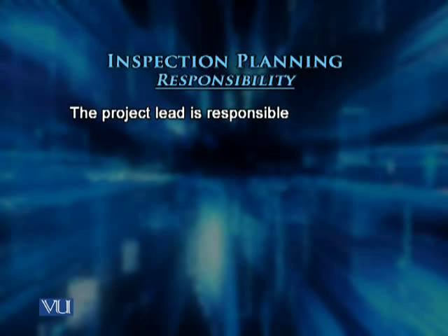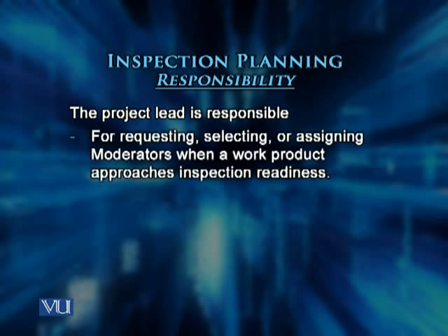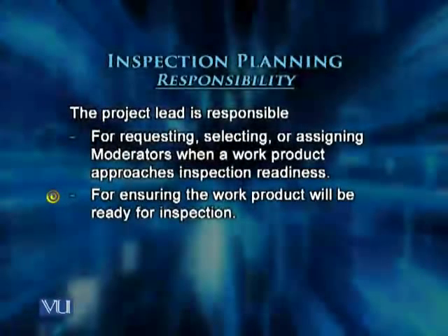Let's now talk about inspection scheduling. Who is responsible for inspection scheduling? The project lead is responsible for requesting, selecting, or assigning moderators when a work product approaches inspection readiness. That is, whenever a work product is ready to be inspected, the project lead must select a moderator. We will talk about moderators and other roles in the inspection process in quite a bit of detail during these lectures. The project lead is also responsible for ensuring the work product will be ready for the inspection.